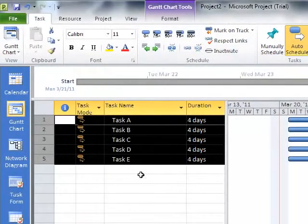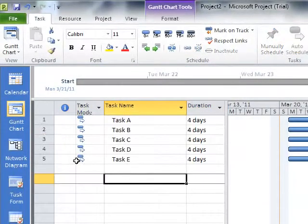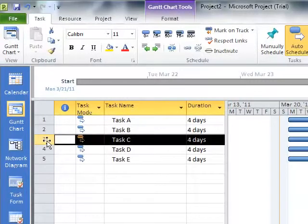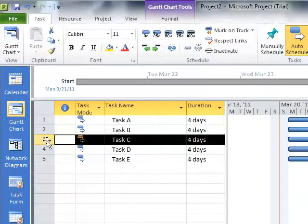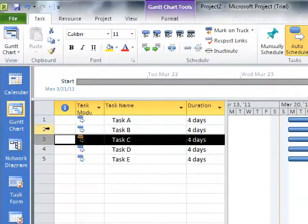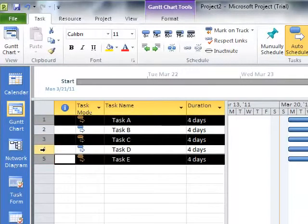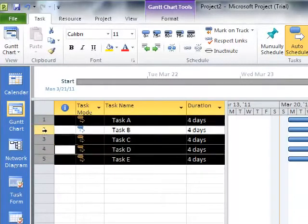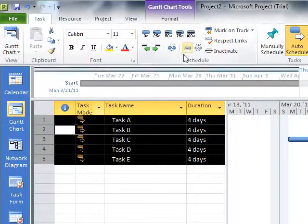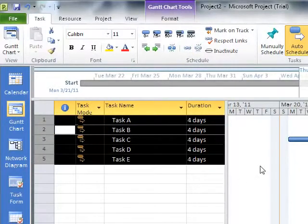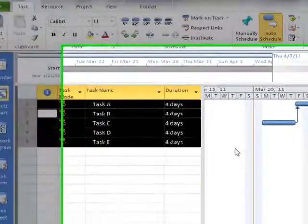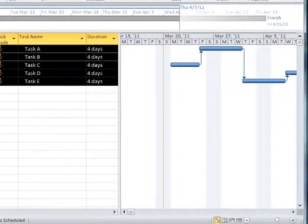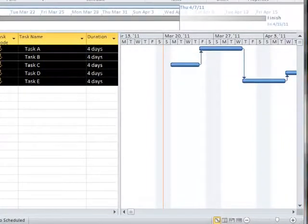I'm going to undo that because there are times when we may want to not go sequentially, but we do have quite a number of Finish to Start linkages. I'm going to hold down the Control key and select Row 3, then Row 1, Row 5, Row 4, and then Row 2. Then if I click Link, it's going to link these tasks in the order in which I selected them while holding down the Control key.